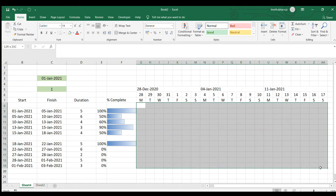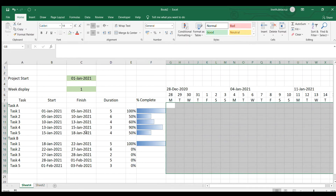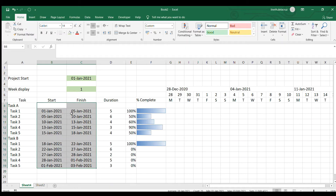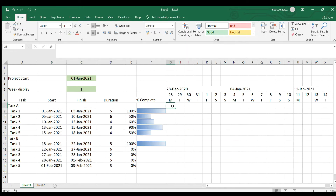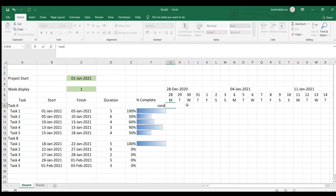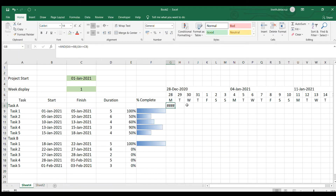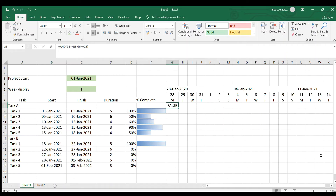Now we'll work on the cell colors. Let's plot the original schedule in a yellow bar on this calendar. To make that bar, we'll use Conditional Formatting with a formula. The formula will be AND — this date is greater than or equal to the start date, and this date is less than or equal to the finish date. As you can see, it returns true or false. If this is true, the color of the cell will be yellow; if false, there's no color.